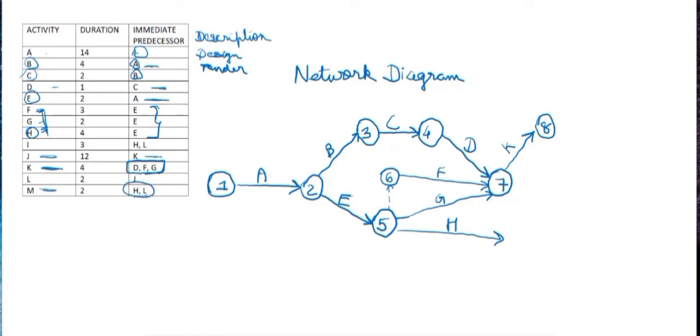Now from node 8 we'll draw the activity J, and then for I and M the immediate predecessor activities are H and L. So firstly let's just draw J.